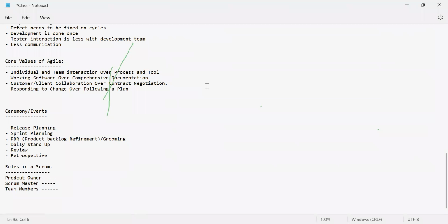Development in one sprint and testing in another sprint cannot happen, unless it is automation. Automation can be done in the next sprint. But the story should be completed within the sprint. So when story points are given, when the capacity is given to a story, it includes both development effort as well as testing effort. And the story is story pointed.